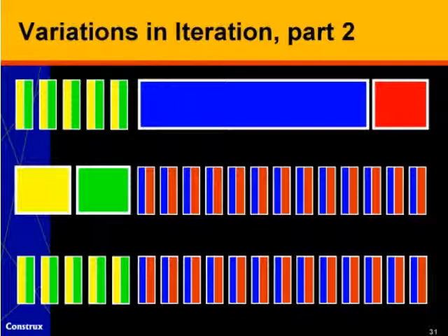Similarly, we could take a big bang approach to requirements, a big bang approach to design, and then go through many iterations of development and test, as shown in the middle line on this slide. Or we could go through multiple iterations of requirements and design, declare the requirements and design to be done, then go through multiple iterations on development, construction, and testing. For an organization that's in a strong stage gate environment, this can actually be a pretty effective approach. It allows you to be iterative to some degree while also still conforming to the organizational requirements imposed by a stage gate sort of framework.